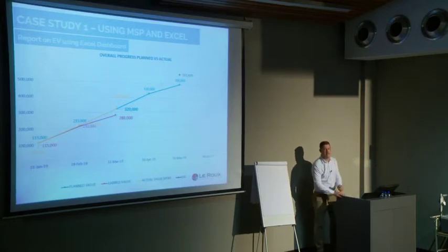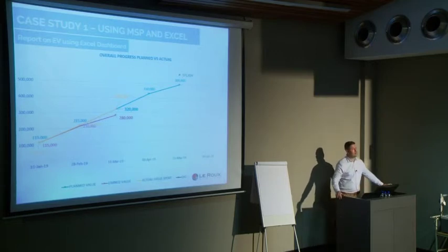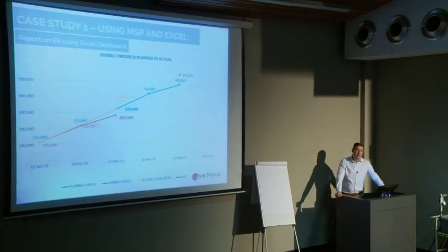Good, okay. So you almost stepped into that trap. The earned value must be measured with actual value. All right. So what I told you is I said planned value and actual value is the same. So be careful. That doesn't mean we are on budget.